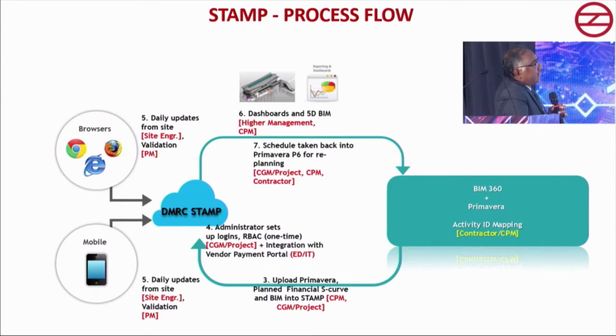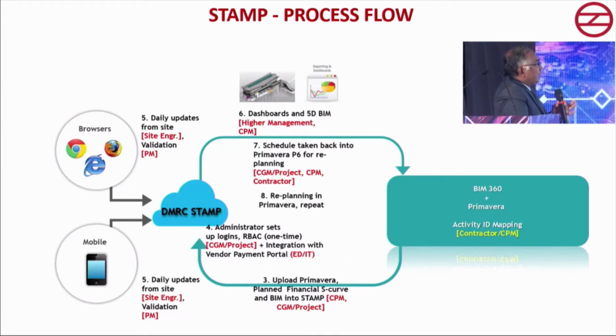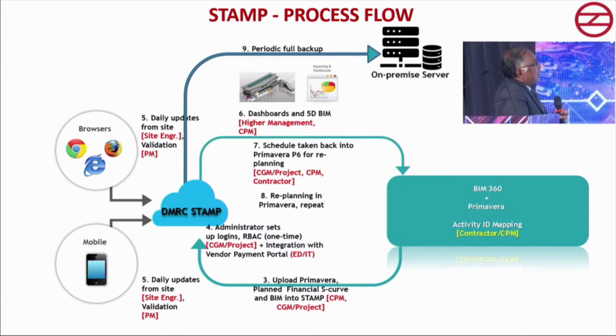Either you extend your time plan, or otherwise, because it is a linear project, where earlier you divided the project into 3 sections, now you can put in more resources and divide it into 4 sections. You can replan it and push for timely execution. So rework can also be done. Replanning is possible.